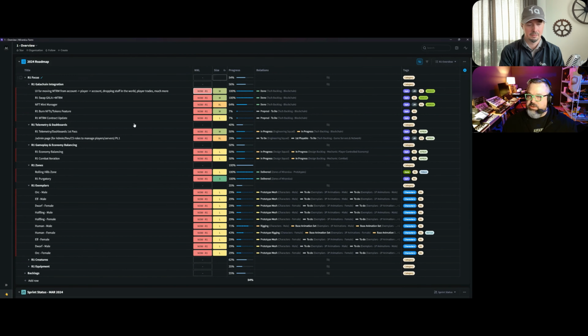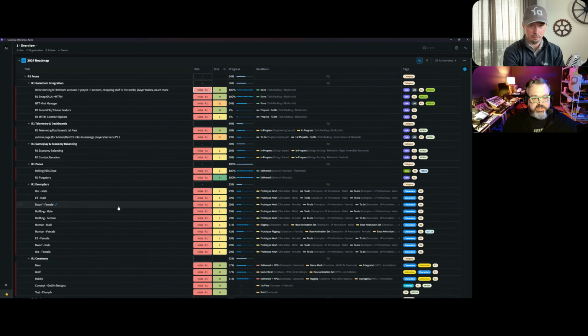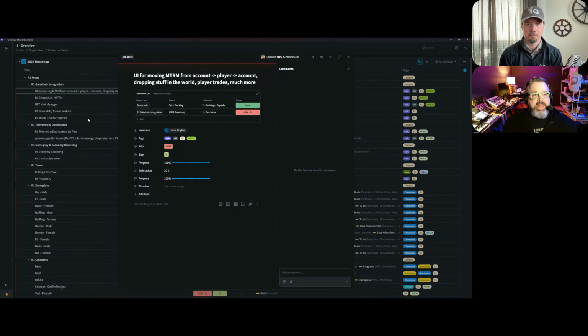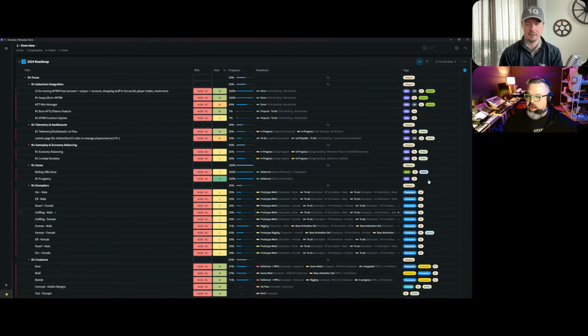And in this view here, we simply have all the epics that the directors care about on this release. So you can see this here. We could drill down on things with the progress here. And how these get onto this board is somebody will tag an epic with a release tag, and then it'll show up in this dashboard. Oh, so you're using an automation for that? Yes. Fantastic. Yes, using automation for that. And then we could also look at the burn down.